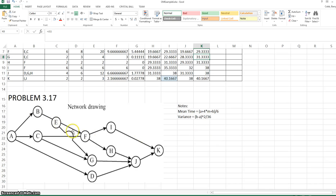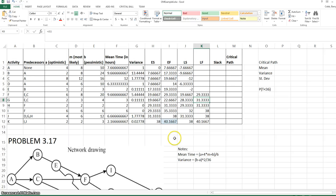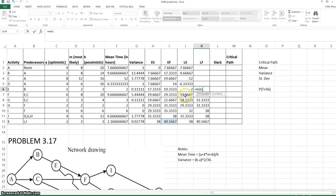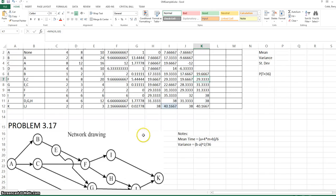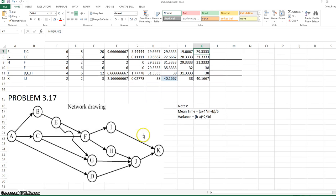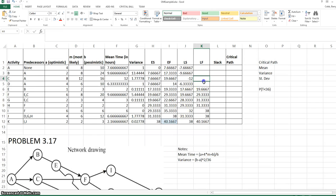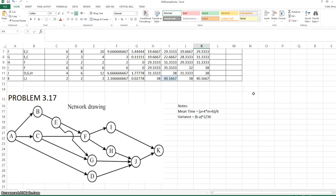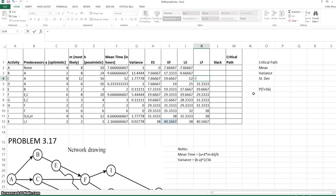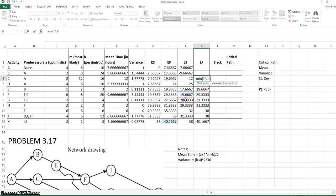Activity E also has two successors in the network, F and G. Its late finish will be the minimum of the late start times for those two activities. D simply has one successor, that's J. C has two successors. Its late finish time will be the minimum late start for F and G.